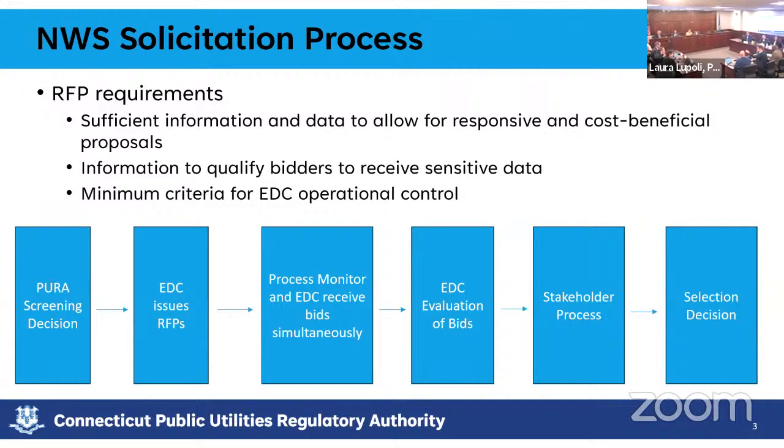Yes, we'll take the cheapest option when we bid. But 10 years down the road, when the contract runs out and the capacity need is still there and the non-wires alternative is there, nobody is stopping that vendor from ratcheting up the prices for complying. Right? The contract runs out at some point, they can renegotiate, they can ratchet up the price. We're so far out of position, a new substation takes 5-6 years. We can't respond in time to do that upgrade. So now they have unilateral price control over those services.